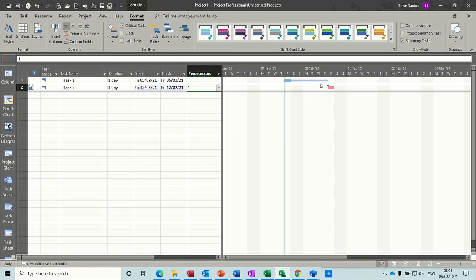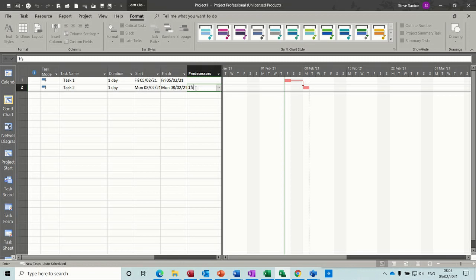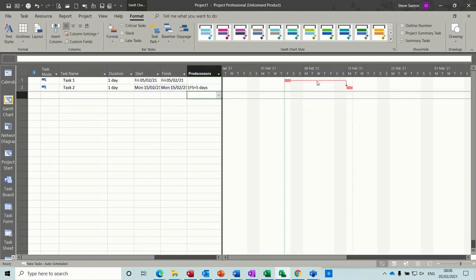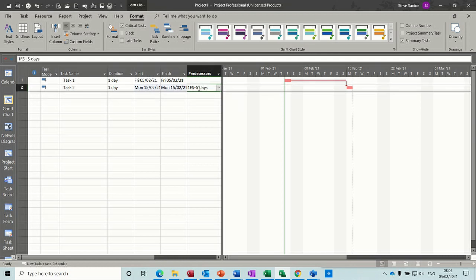If you want to change that, you can change that in options. At the moment it's on the default setting. However, if I just undo that, if I want to put a lag on that, so if I go 1FS plus 5. This should have been plus 4, but never mind. It gives you the indicator that that is a critical path. So this is just drying time. So you could show a critical path by using the lag feature.